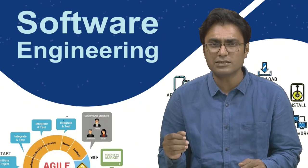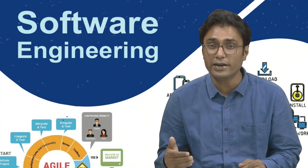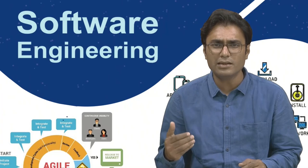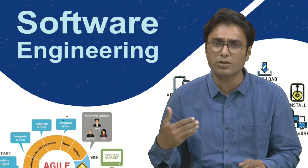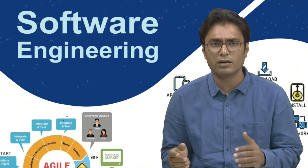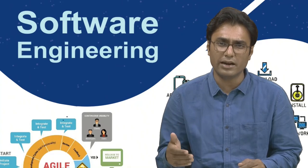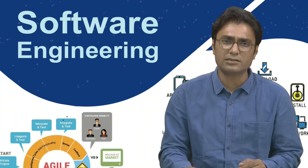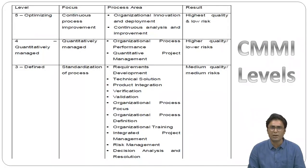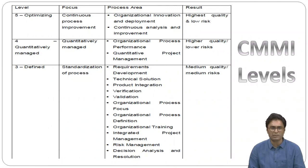Each maturity level provides a necessary foundation for effective implementation of processes at the next level. Higher-level processes have less chance of success without the discipline provided by lower levels. CMMI defines each process area in terms of specific goals and specific practices required to achieve these goals. To achieve a maturity level, the specific goals and associated practices must be achieved. On the next slide you can see a table of CMMI levels with their process areas and results.